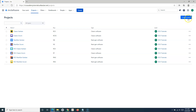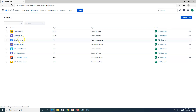If the Create Project button is not available for you, that means you are not allowed to create a project. By default, all users in Jira will have the ability to create the next-gen project, not the classic project. You can see here I have classic Kanban and classic scrum — these projects only a Jira administrator can create. But next-gen Kanban and next-gen scrum can be created by users in Jira by default.